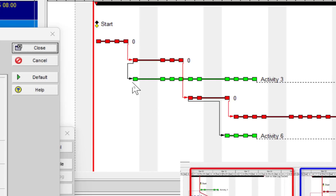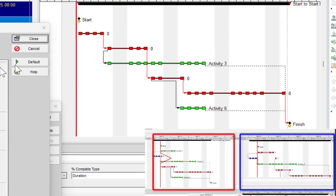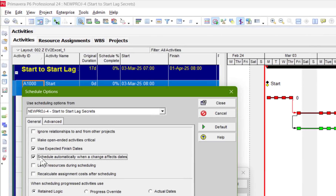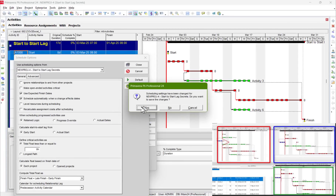Activity 2 and activity 3 have a start-to-start relationship. Activity 3 has finish-to-start with the end, and activity 2 and 4 have finish-to-start. Activity 4 and 6 have a start-to-start relationship, and activity 4 and 5 have finish-to-start. Now calculating — the default setting is on Primavera P6, so I'll just schedule automatically to see what's going on.